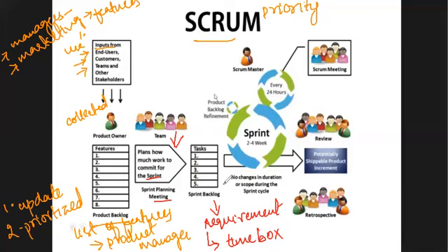Now, when you're within the sprint backlog, the product backlog is going to be frozen. That is, no changes are accepted when you're performing the sprint backlog. Now, when you have identified the different tasks and you're working on that, it is written in here, no changes during the scope of the sprint cycle. Until this entire thing is completed, you're not going to make any changes in here.